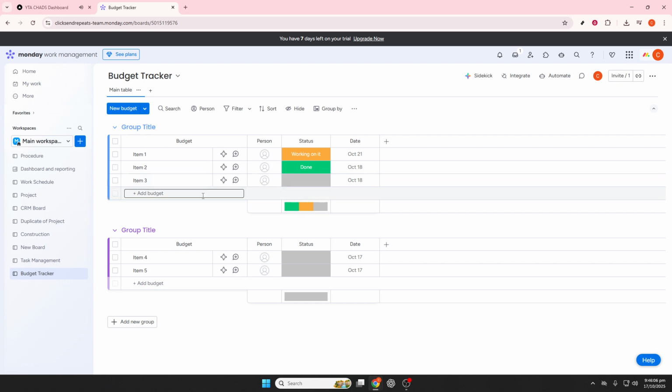If your goals span multiple teams, align them by using the Connect Boards column to link strategic goals with each team's project board, such as the marketing plan or product roadmap. Follow this by adding a mirror column to display progress or KPIs from those linked boards. This not only ensures visibility across the organization, but also keeps everyone informed in real time.